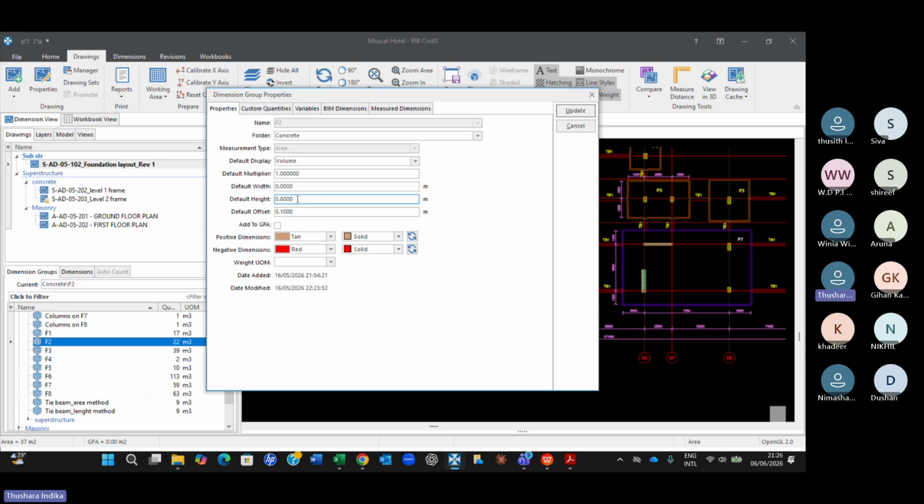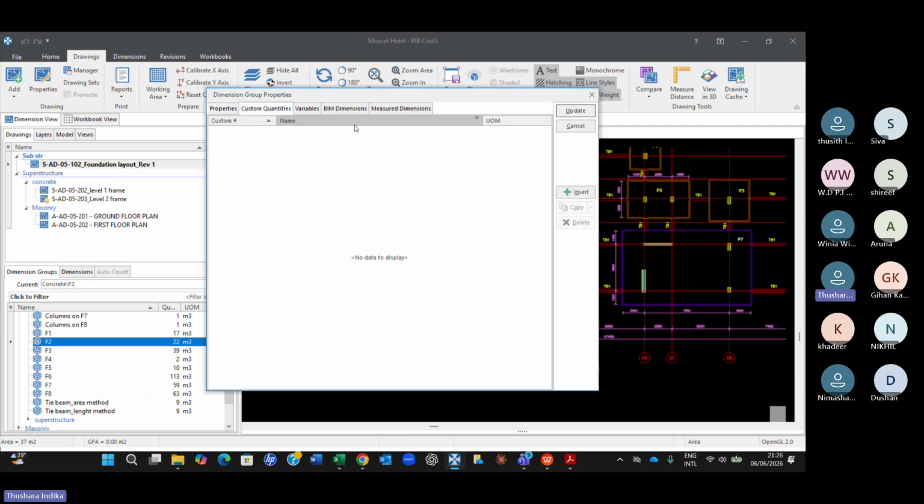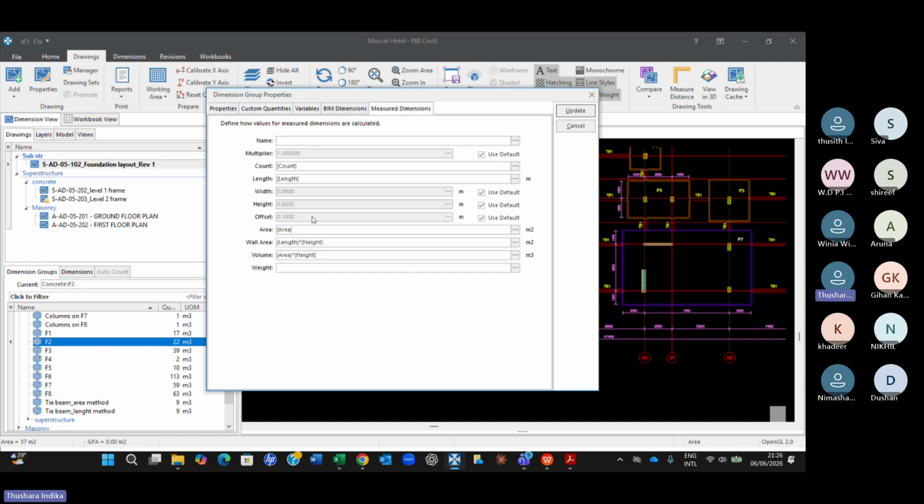But now, since you are doing backward, you have to again introduce 35A here because you have introduced that 35A in the F1, correct? And you have to introduce the equation also again. But what you need to do when you first do the concreting, you can introduce that parameter and then take a copy to F2, F3, F4, and so on. So you don't have to redo it again.